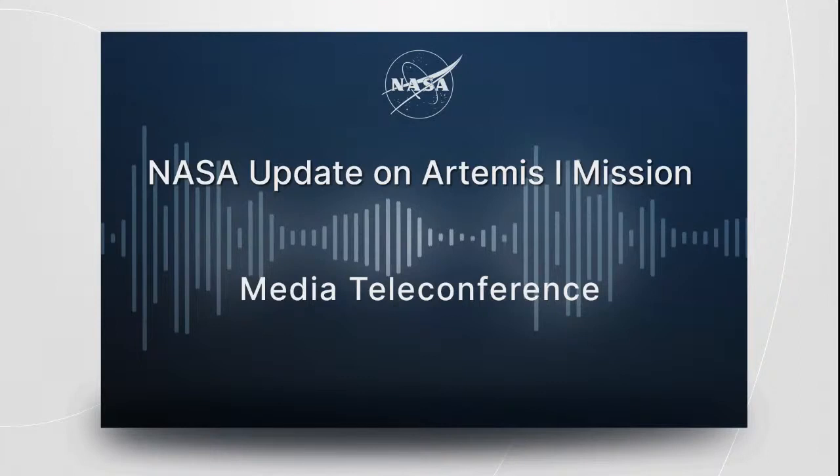As we head towards our launch window that Tom Whitmire mentioned earlier, we do have a roughly 15-day launch period in February. Half of those are what we call long class missions. Duration is about 6 weeks, where we'll spend a little bit of extra time in the distant retrograde orbit to set up landing lighting conditions at the splashdown zone. And then the second half of that window is what we call short class missions, which is about 4 weeks in duration. We know exactly the duration of each mission opportunity. It's day dependent, and it's really tied to some of the objectives that we have.